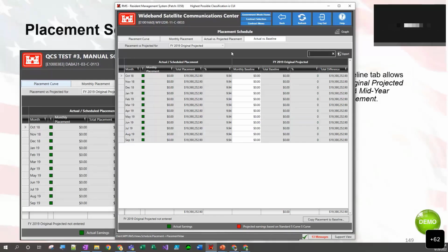When it comes to placement, one of the things that we usually tell people is to make sure not to go back and try to change what you've set already. A lot of the times when people get in trouble with placement and placement curves, progress and whatnot, it's because they set the contract a certain way when the contract started. As the contract goes, obviously it's reporting non-green progress, right? Or placement, or however you want to say it. Those obviously mean two different things.